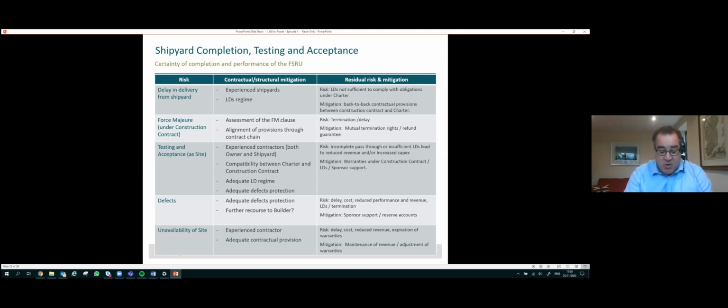The FSRU sponsor will also want delays attributable to the fault of the builder to extend delivery as well, although the project will usually require any liquidated damages payable under the construction contract, or at least a large portion thereof, to be paid onto the project. Now, clearly the FSRU sponsor will not wish to pay more liquidated damages to the project than it received from the builder, and ideally substantially less to cover its own costs for delay in delivery from the shipyard, such as financing costs, increased supervision costs, etc.